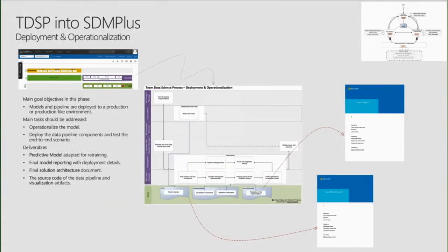And this is important because, as you see, we already have four different steps, but we put more focus at the beginning on business understanding, data acquisition, and also data modeling before moving into the operationalization. We only move into operationalization when we make sure that we reach the accuracy of the model that the customer is expecting, okay?